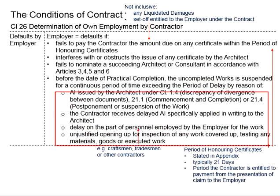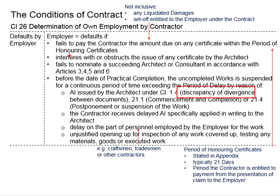The circumstances that can constitute employer default include, first, a discrepancy or divergence between documents. When the contractor detects discrepancy or divergence in the contract documents, the contractor needs to seek clarification to rectify this by sending a notice to the architect. However, if this leads to a pending situation where the contractor cannot carry out the work and the pending duration exceeds the period of delay, then the employer can be considered in default.